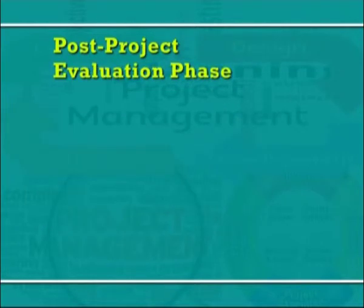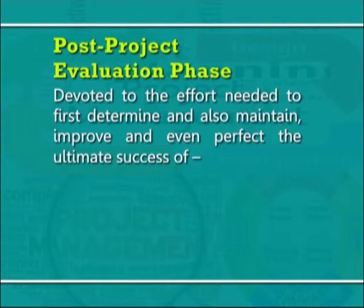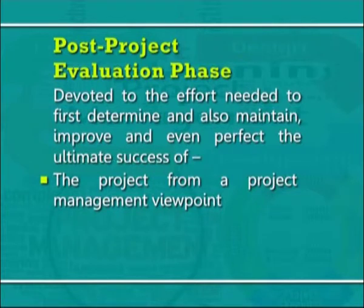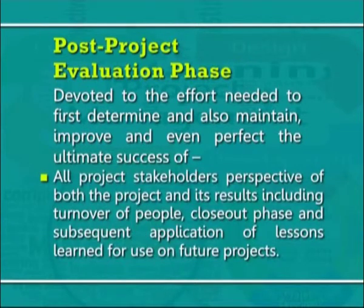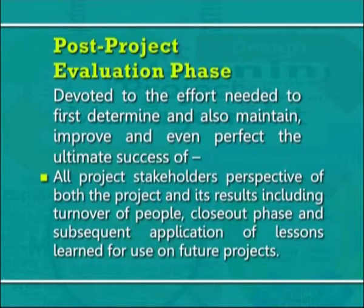Post-project evaluation phase — following the standard project close-out phase, the post-project evaluation phase is devoted to the effort needed to first determine and also maintain, improve and even perfect the ultimate success of the project from a project management viewpoint: the project's product and results, all project stakeholders' perspective of both the project and its results, including turnover of people both during the project and after the project close-out phase, and subsequent application of lessons learnt for use on future projects. This evaluation phase will also identify weaknesses and threats that can turn into opportunities leading to the incubation feasibility phase for future projects of the organization.